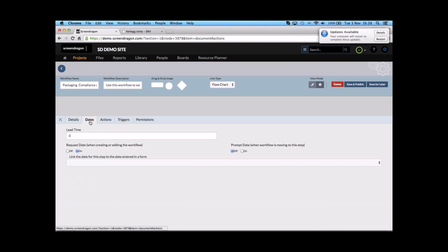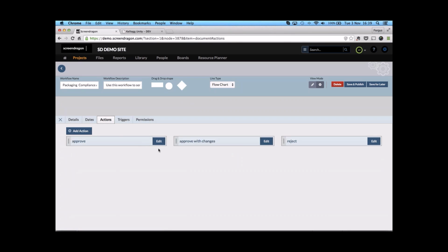We can set it up so that if you're responsible for a step, once that step starts, you'll get an email notification. But what can often be more important than those sort of event-driven emails is that when there's a blockage or a roadblock, such as someone misses the email or somebody might be on vacation, the system knows that if something isn't done on time, it's escalated to the right people. And whether that's a case of an email alert goes out to a backup person, or whether it goes to the person who initiated the workflow to let them know that the due date could indeed be at risk.